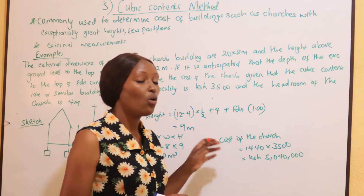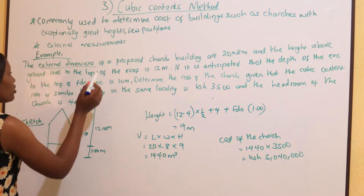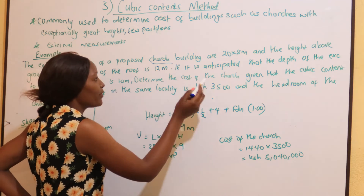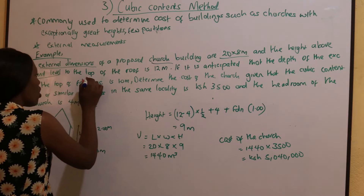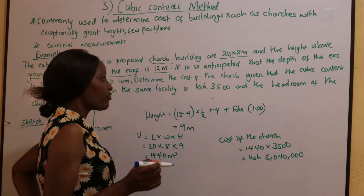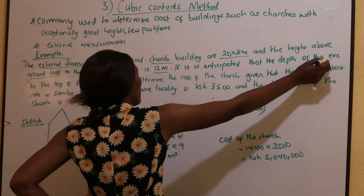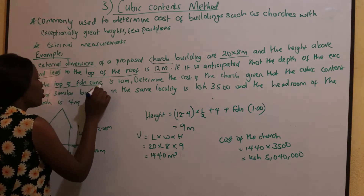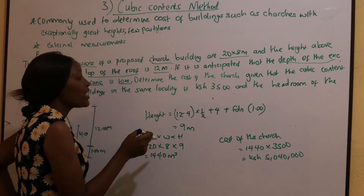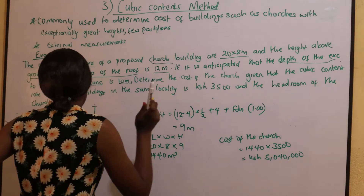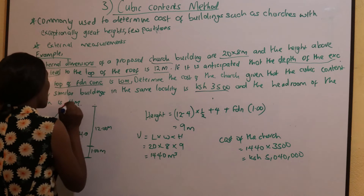Here is an example of how you calculate using the cubic content method. The external dimensions of a proposed church building are 20 by 8 meters. The height above ground level to the top of the roof is 12 meters. It is anticipated that the depth of excavation to the top of the foundation concrete is 1 meter. Determine the cost of the church, given that the cubic content rate of similar buildings in the same locality is 3,500 shillings, and the headroom of the church is 4 meters.